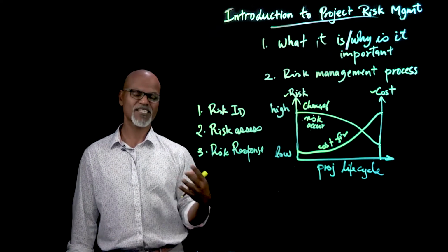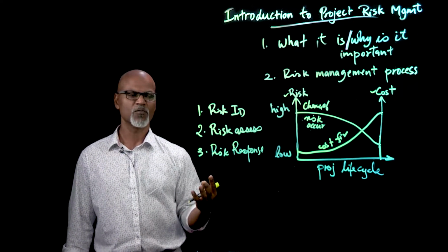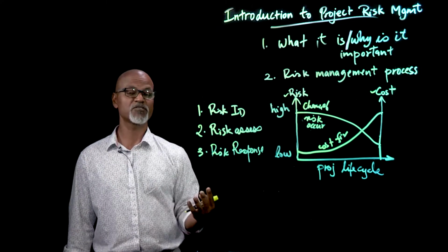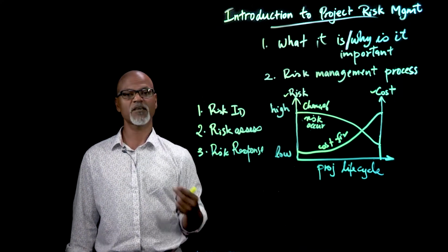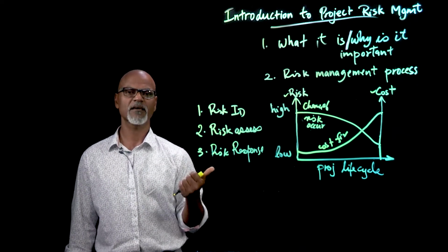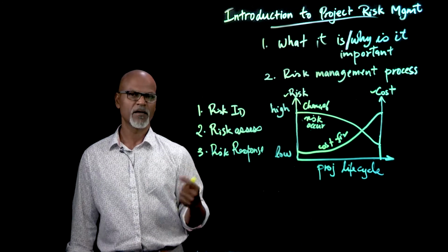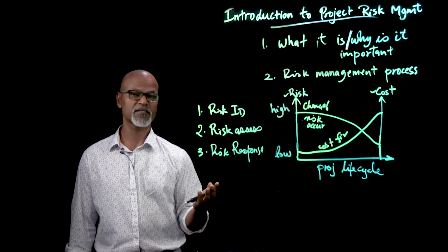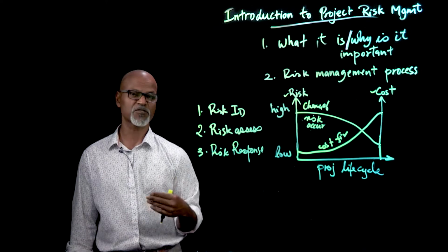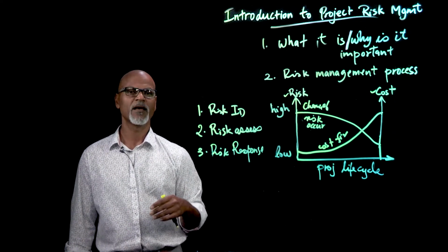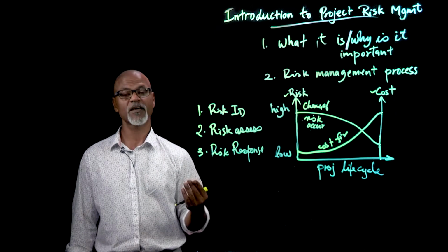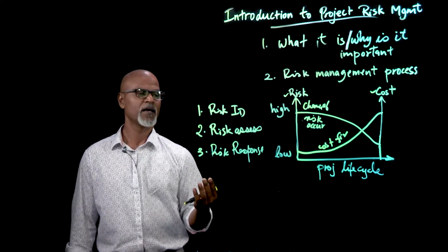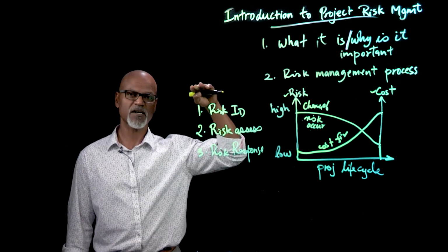The next step would be assessing those risks. Not all the risks in a project would have the same impact. Coming back to my running example, the risk of injury would be pretty severe. When we think about risk assessment, we think about 2 things: severity, and the likelihood of that risk happening. In terms of running, the risk of injury is pretty severe because it means that you may not finish your race, or you may never even start the race if you get injured during your training program. The second aspect is the likelihood. The likelihood of getting injured is pretty high when you're training and even while you're running your race. And so that would be high up the list of risk factors.